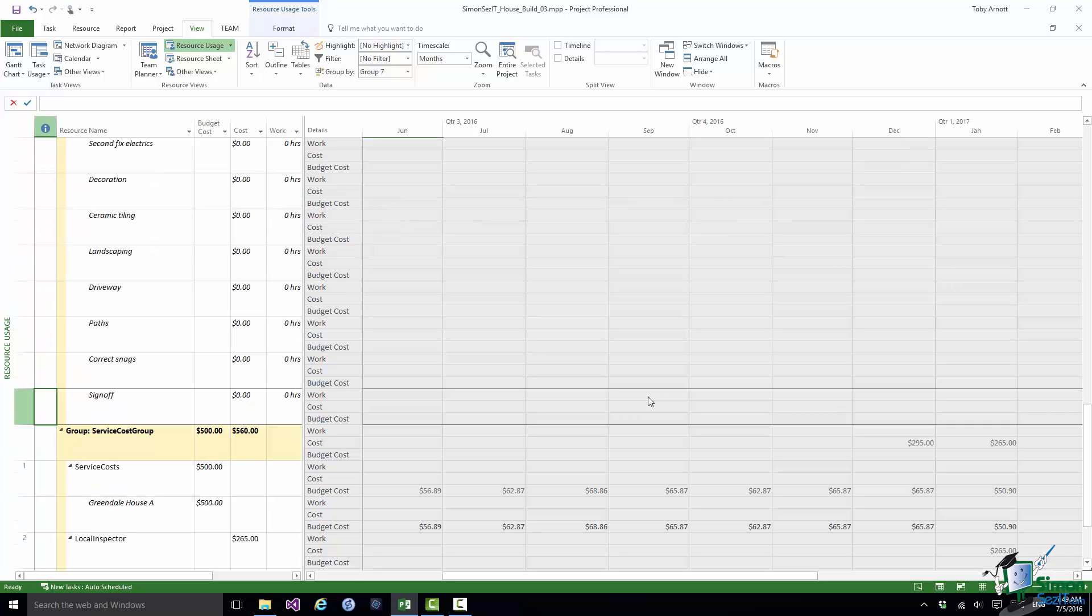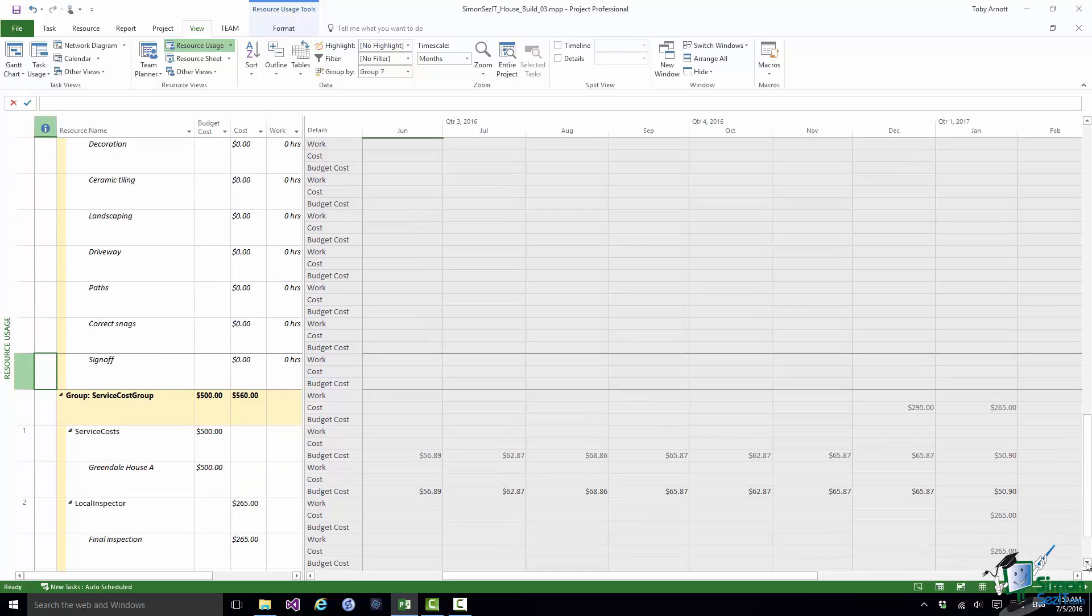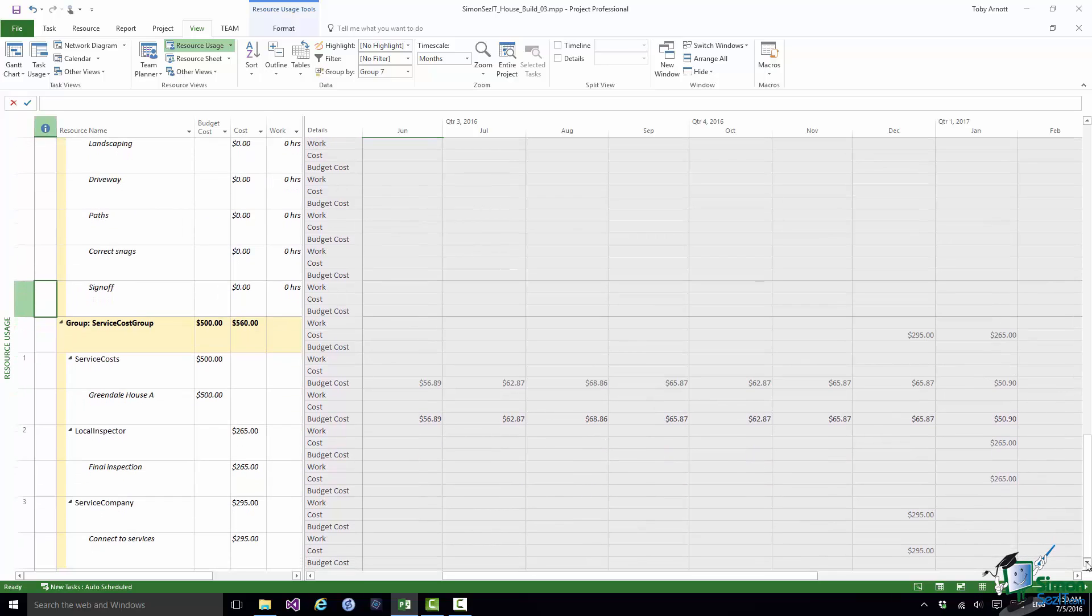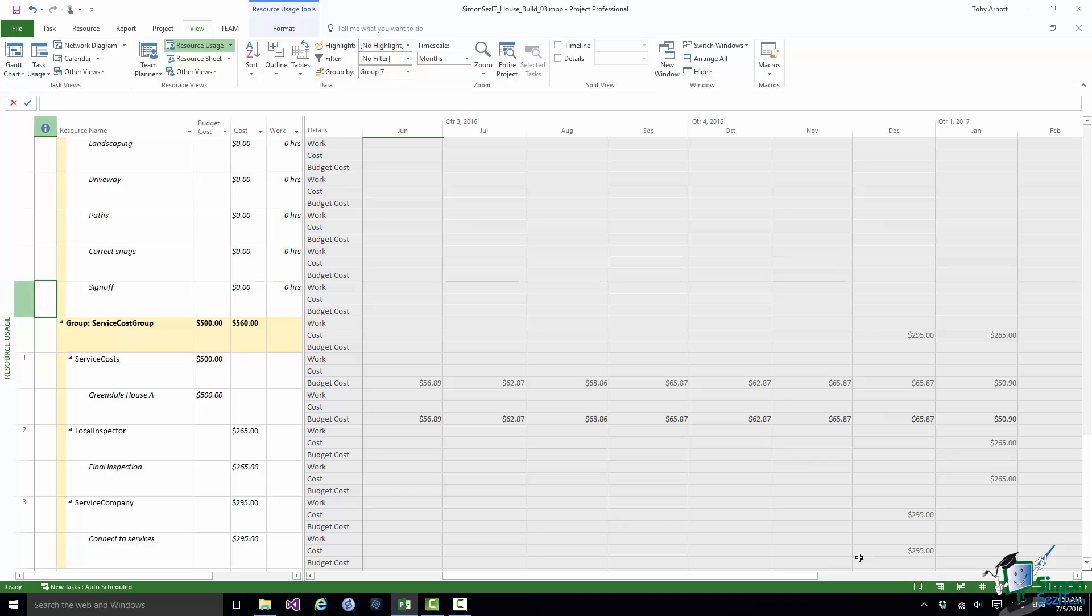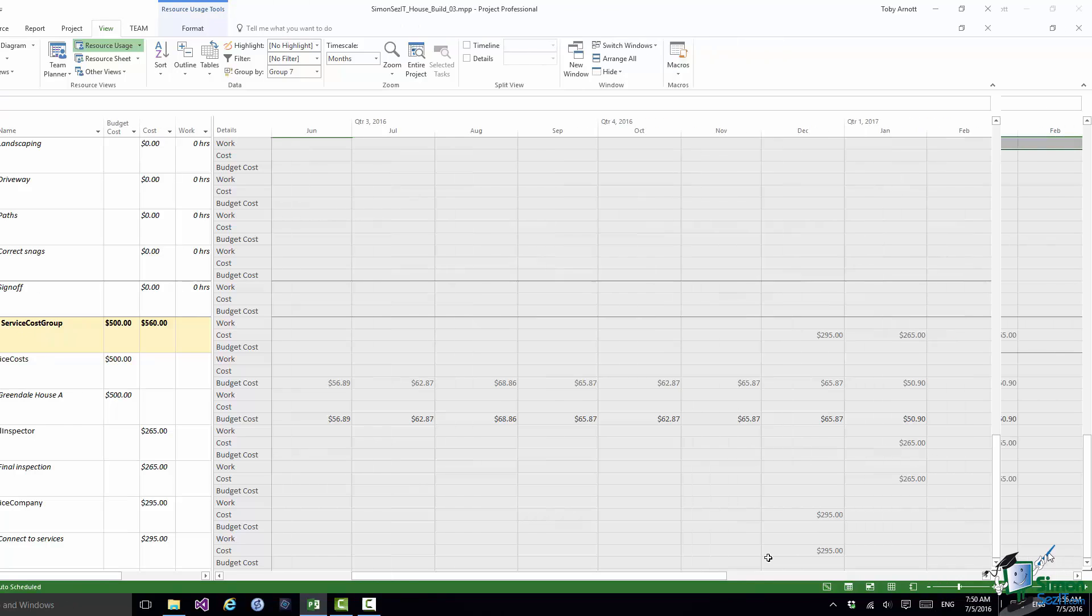What Project 2016 does is to actually time phase that budget cost for you over the period of the project. And of course it just divides up that budget cost into those convenient slices for you. You may want at the outset if you realize that you are only going to be spending from this budget cost amount towards the end of the project you may want to change this distribution of budget cost to reflect the fact that you're going to be spending the money later on. Otherwise you'll appear to be doing better on cost earlier on in the project than perhaps you should be because you won't be spending any of your service costs until right near the end of the project.